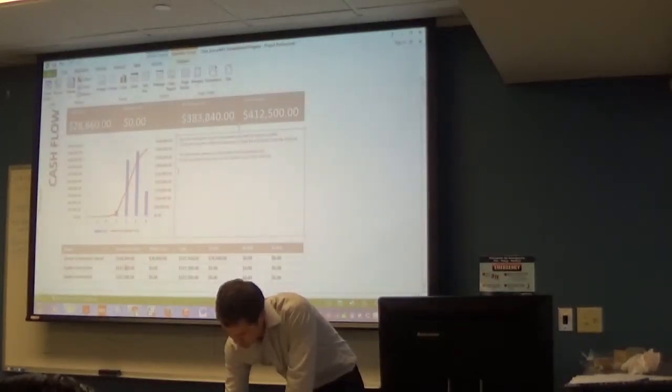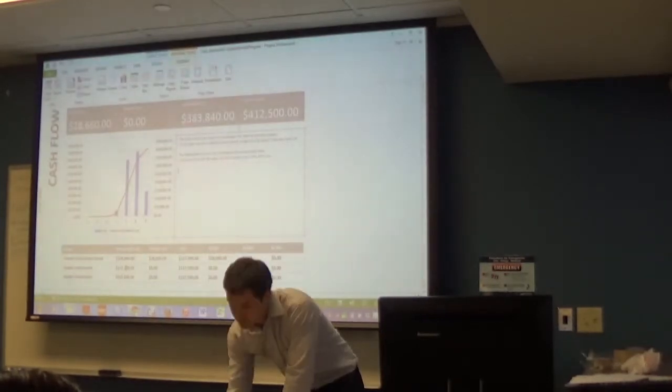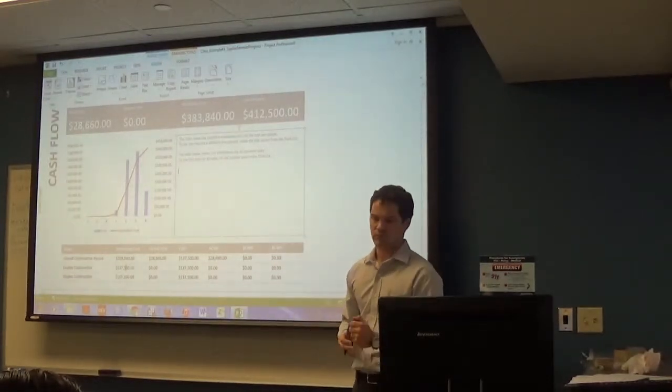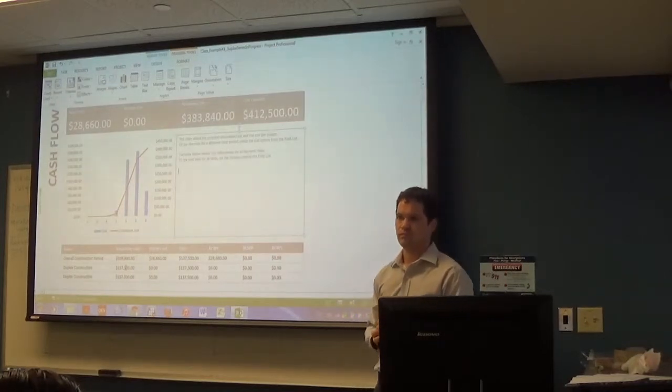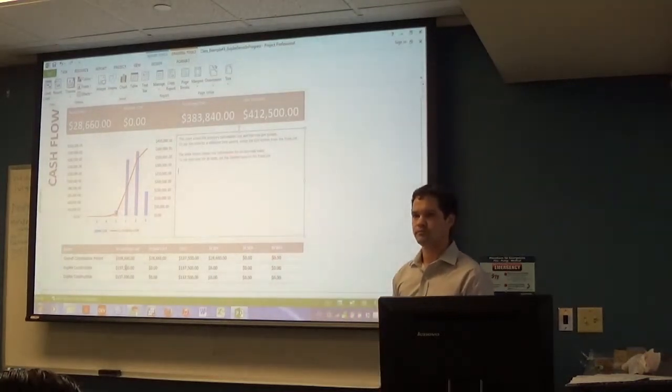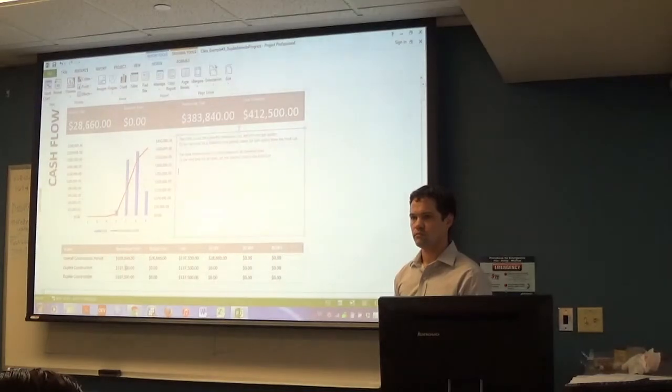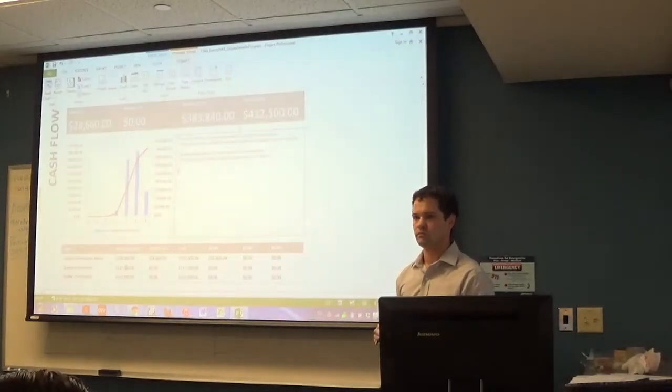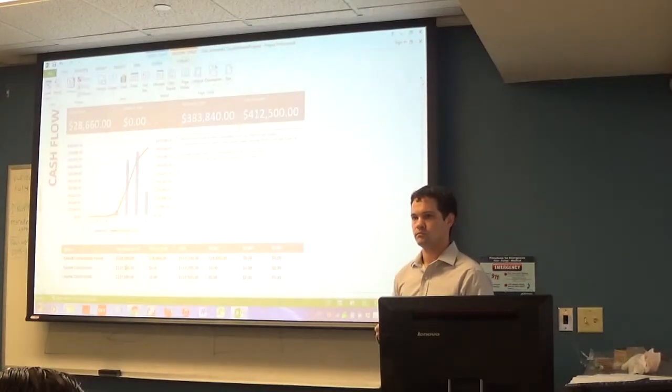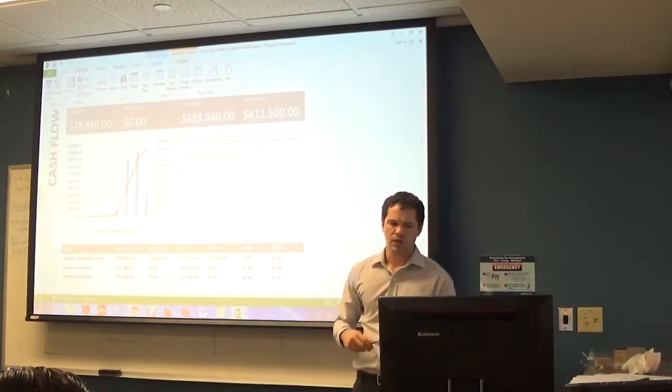Honestly, I'm not sure. It's a good question. I guess rain days won't matter on a non-critical path function. If the roof is on and the place is dried in, it won't affect stuff being done on the inside. But if the roof isn't on and it's raining, then no work can get done on the whole project. Is there something like an estimated contingency in there?